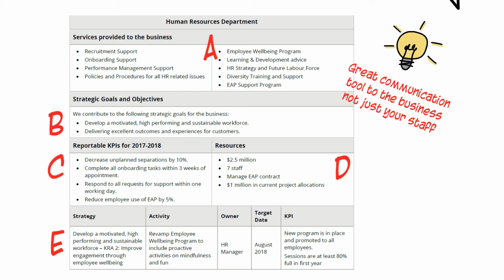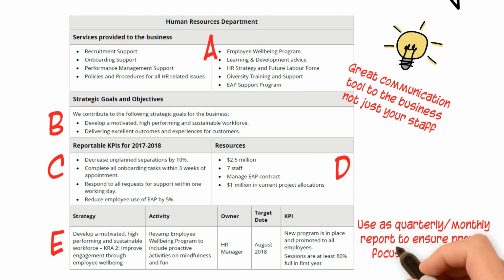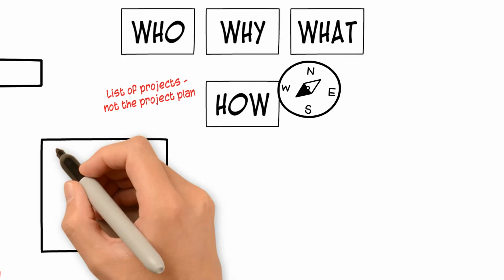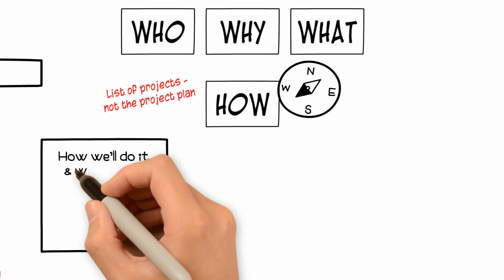Who is responsible? The anticipated date of delivery and high-level KPIs. You could also include the budget. Note, if you have this detail, then you can turn this into a reporting template to track the progress of your planned activities. You might add a status column to support that.